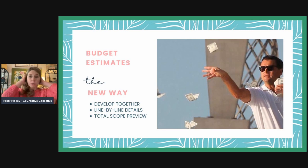So when I do a budget for, let's say, a family room, I list out every single item that I think they're going to need for that room. Obviously, that's not perfect. It's a little bit art, a little bit science, but at least to give them an idea of these are the things that I think you're most likely going to need. These are things that we may or may not need. But overall, this is how I came up with the number for your specific budget for this room.